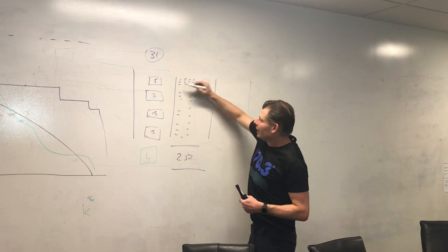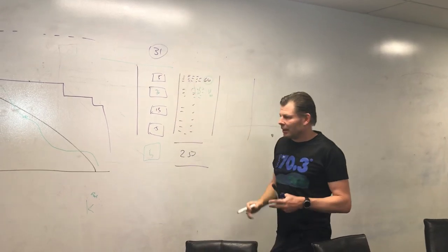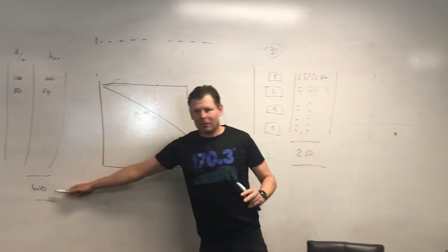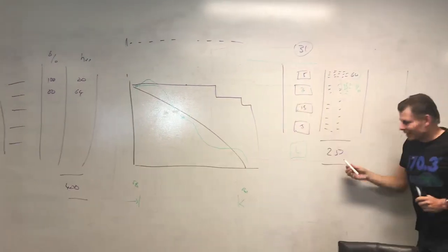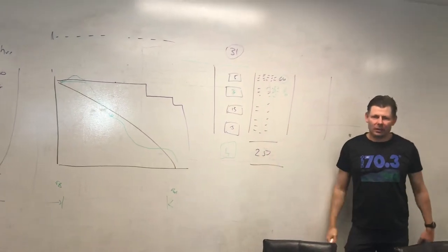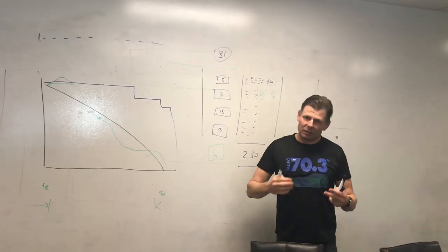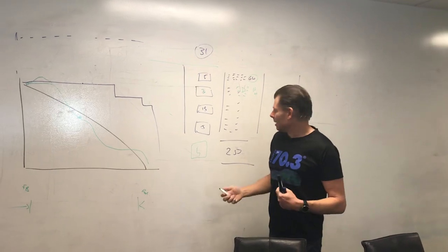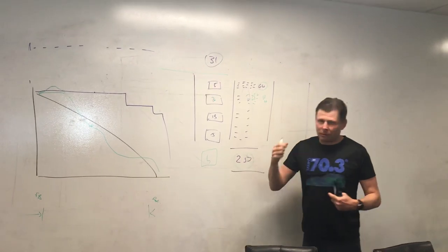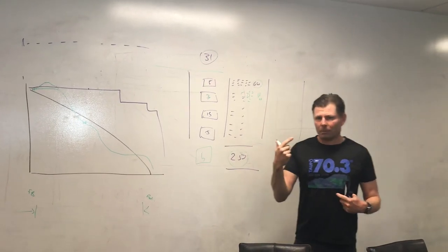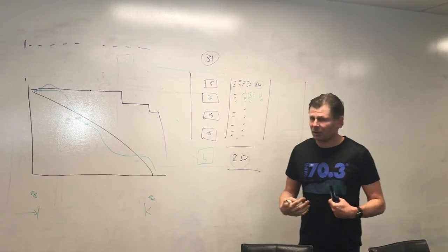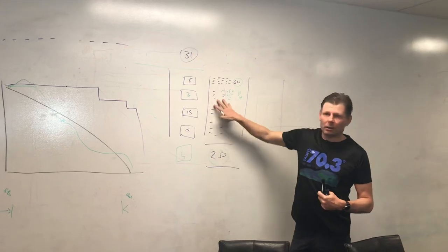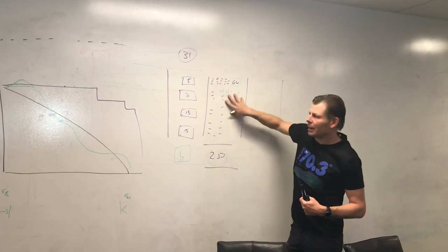So at the end, when I add these up, and again, it's just my experience with the teams I've worked with, if they had a maximum of around 400, I generally get somewhere around 250. With your team, it's going to be different, and it's going to take time for you to get that gut feel of what it generally is. That number here has nothing to do with capitalization. It's got nothing to do with KPIs or performance reviews. And we know there's lots of other things that we do for the company that are not included here. This just helps us plan.